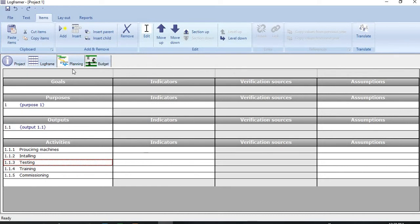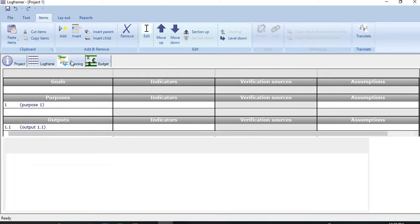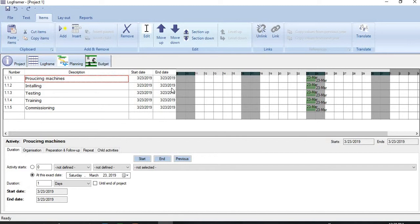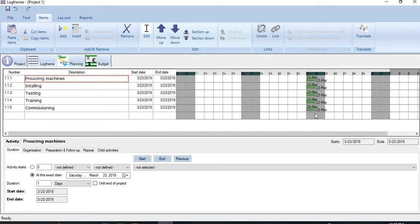Now let me click Planning. The moment I do it you see here all those activities are appearing here with the start date and end date. LogFramer uses the current date as the start date and end date by default. Other than that you see here in the bar chart, bars of all activities are also appearing.